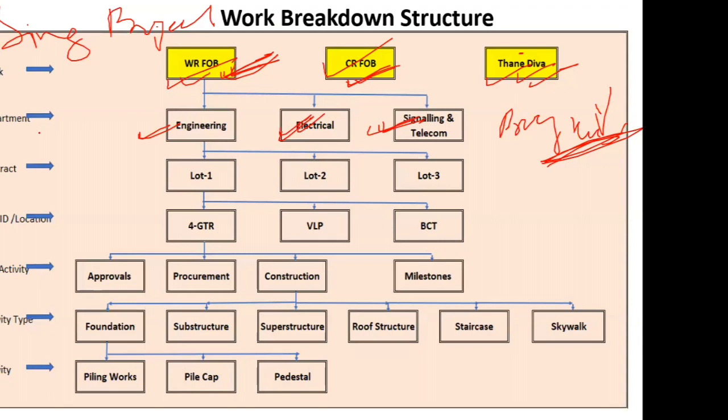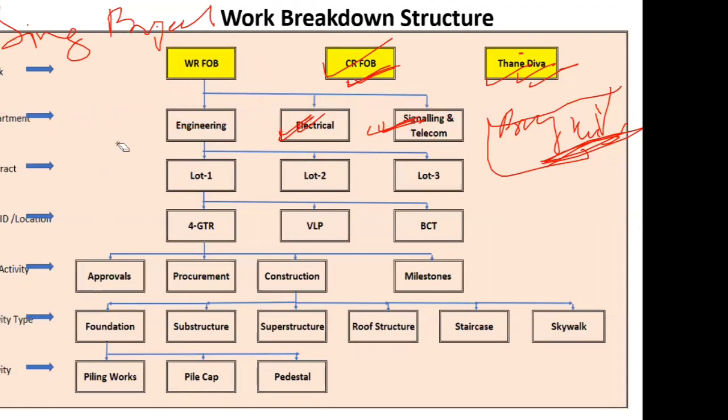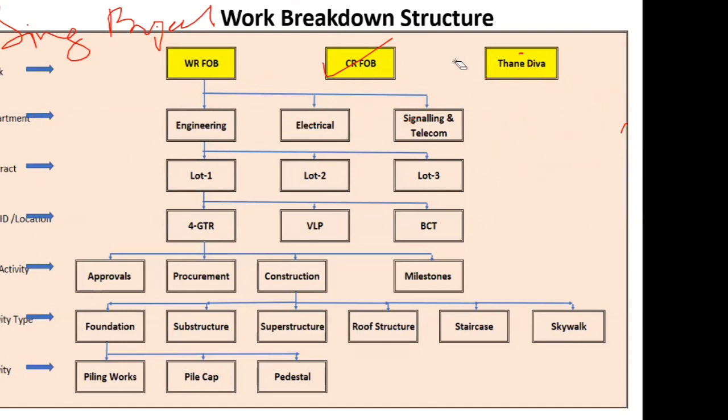So think about it, if you haven't divided your WBS into departments, if there was no such level, you have not broken down this level, right? Then would you be able to give this answer? No. So you need to think as a planning engineer how you need to divide, or how you need to break your WBS, right?